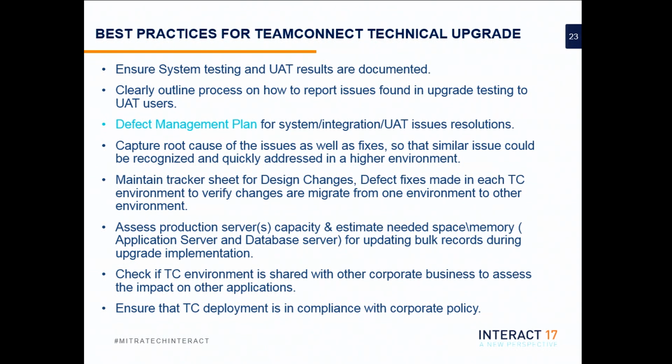So I think the bottom line of my whole 5 cents is please have enough time for testing. And don't forget about different types of testing, integrations testing, performance testing. With performance testing, you also don't want to go live without it, and we did have it built in. We asked our system business owners to make sure that the system performs in terms of output time as they expect, but then, going live, people were complaining, oh no, I have this legal matter and it has invoices from 10 years back, and I have to sit and wait while the screen redisplays all of it.